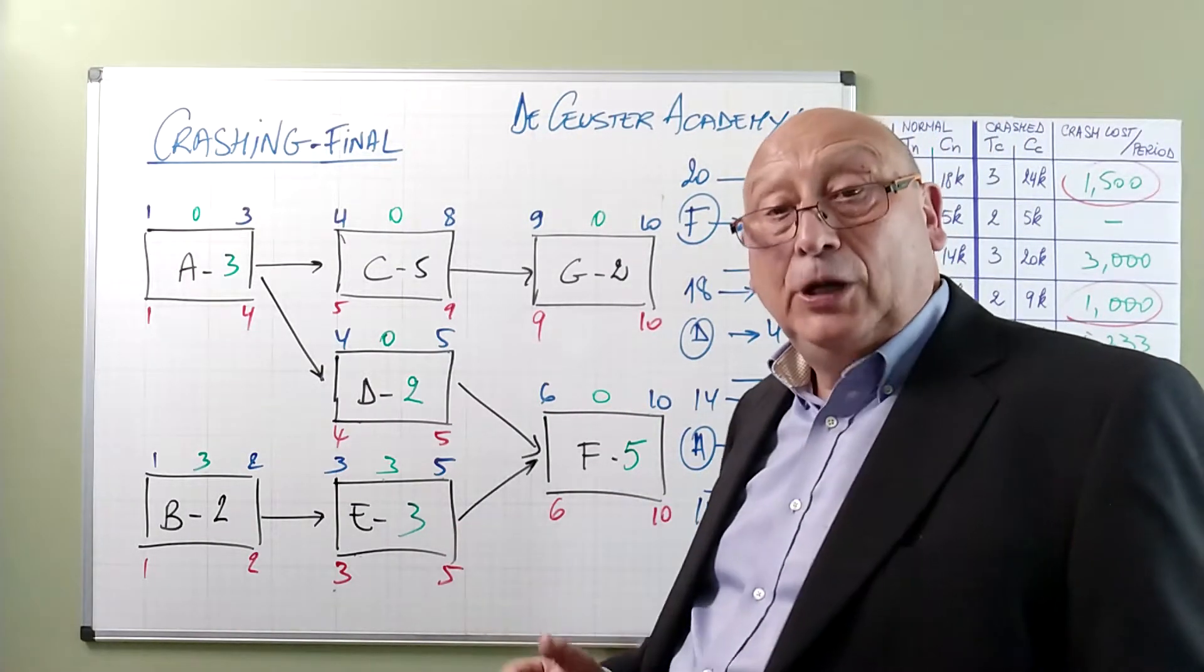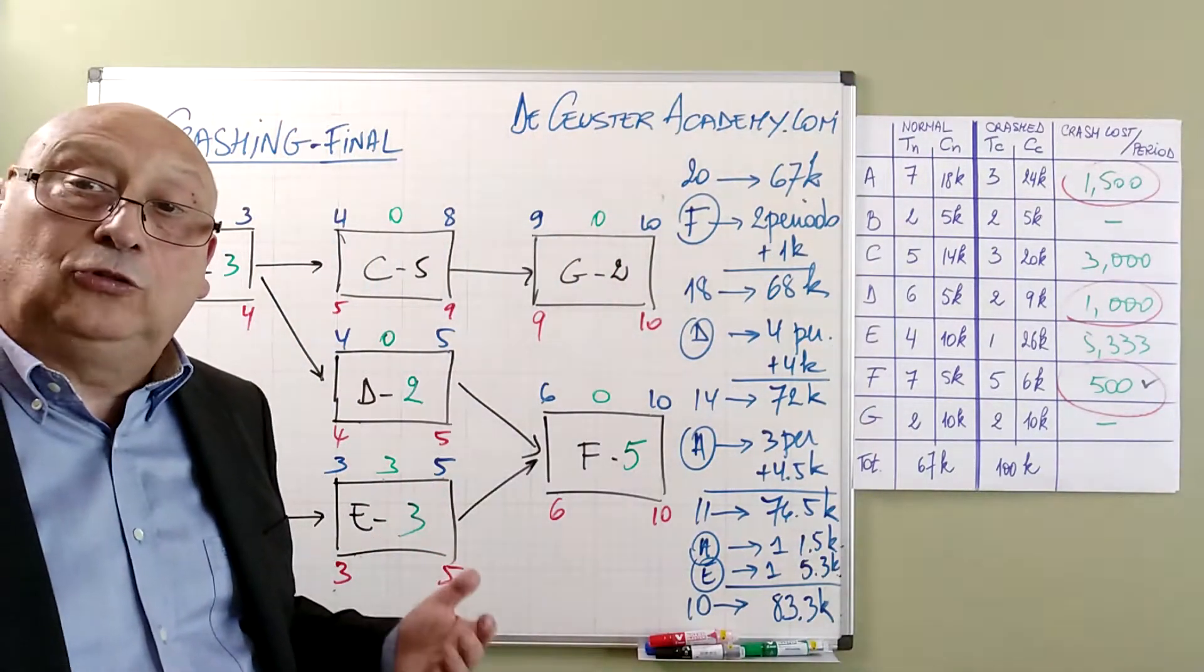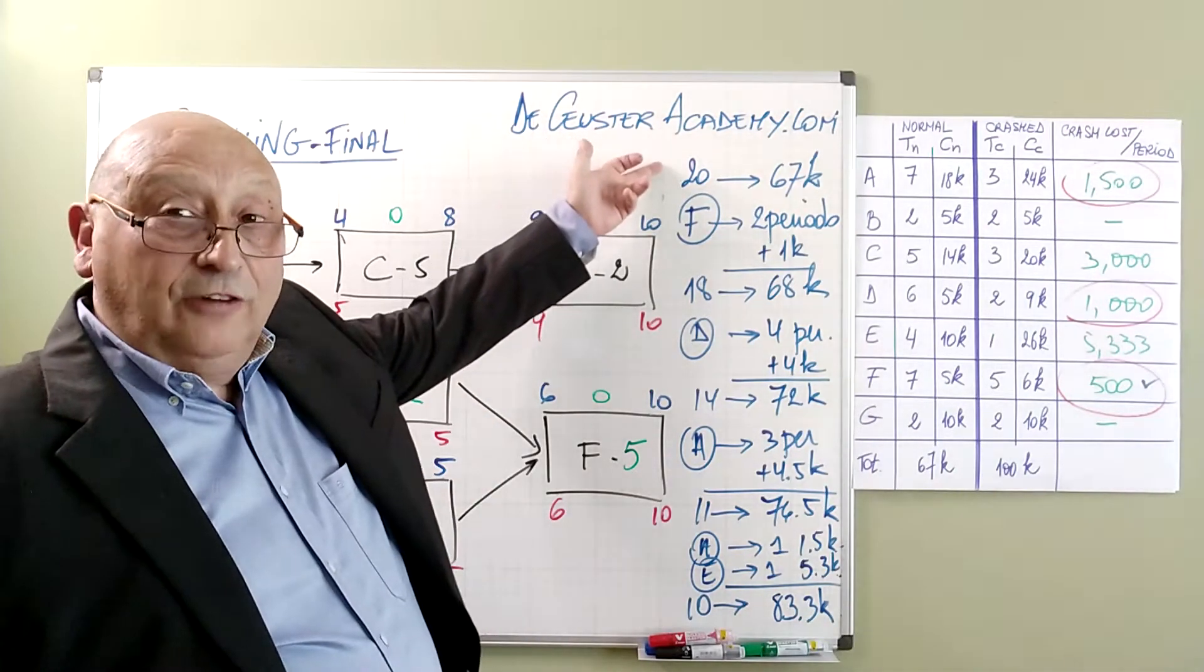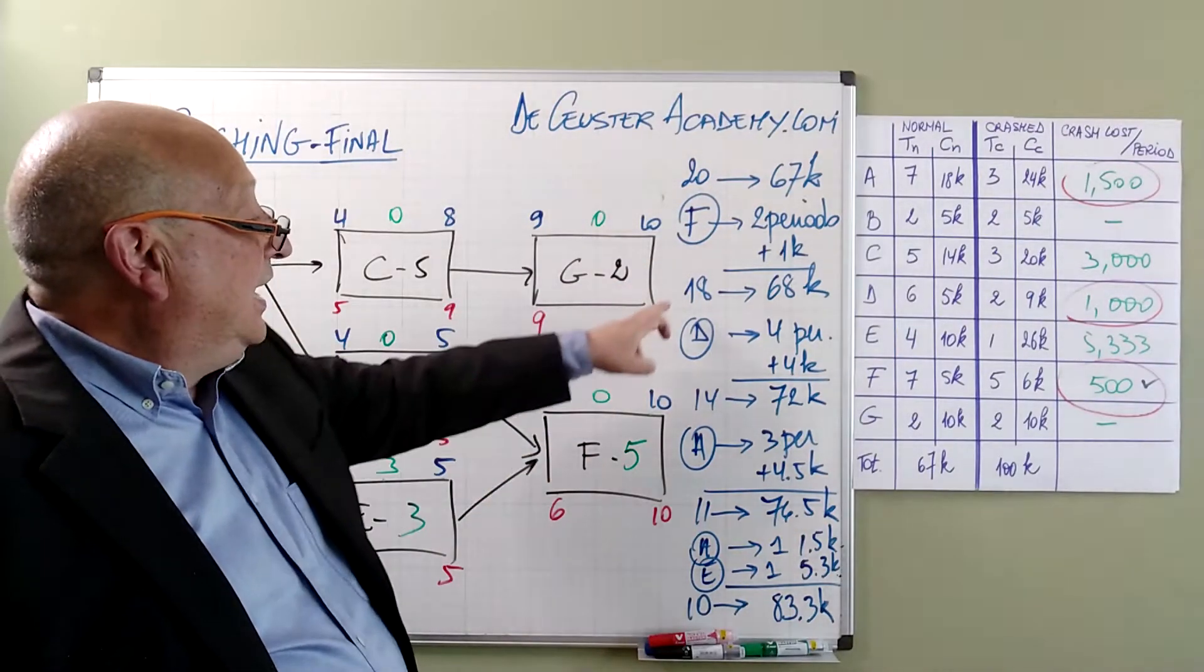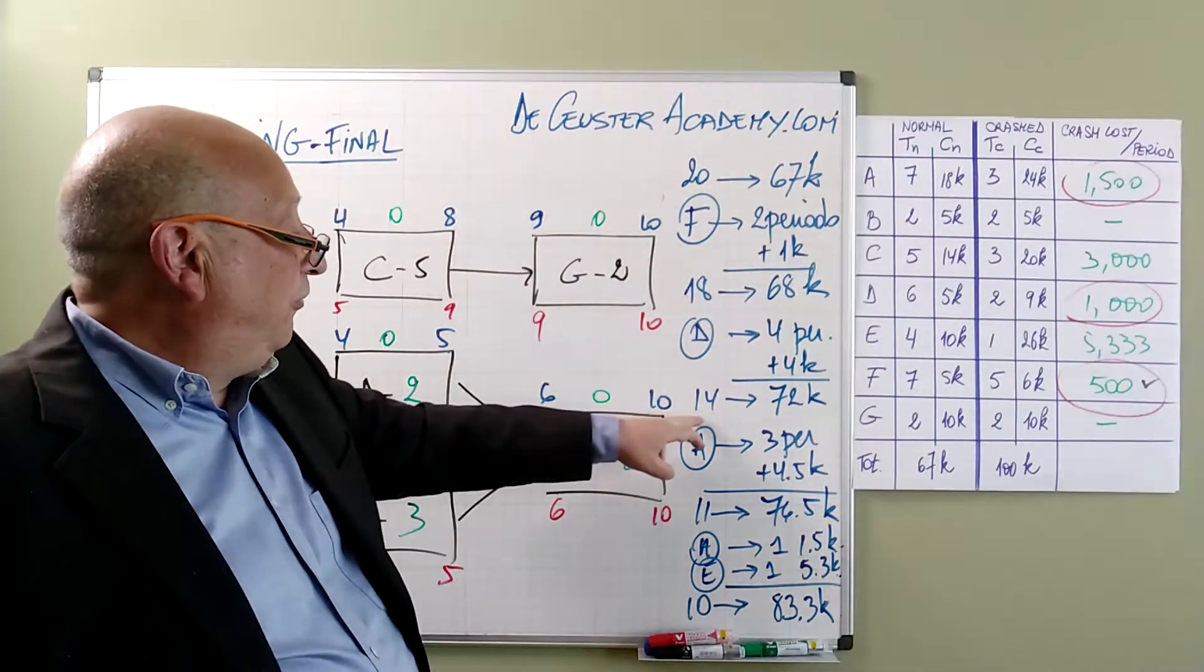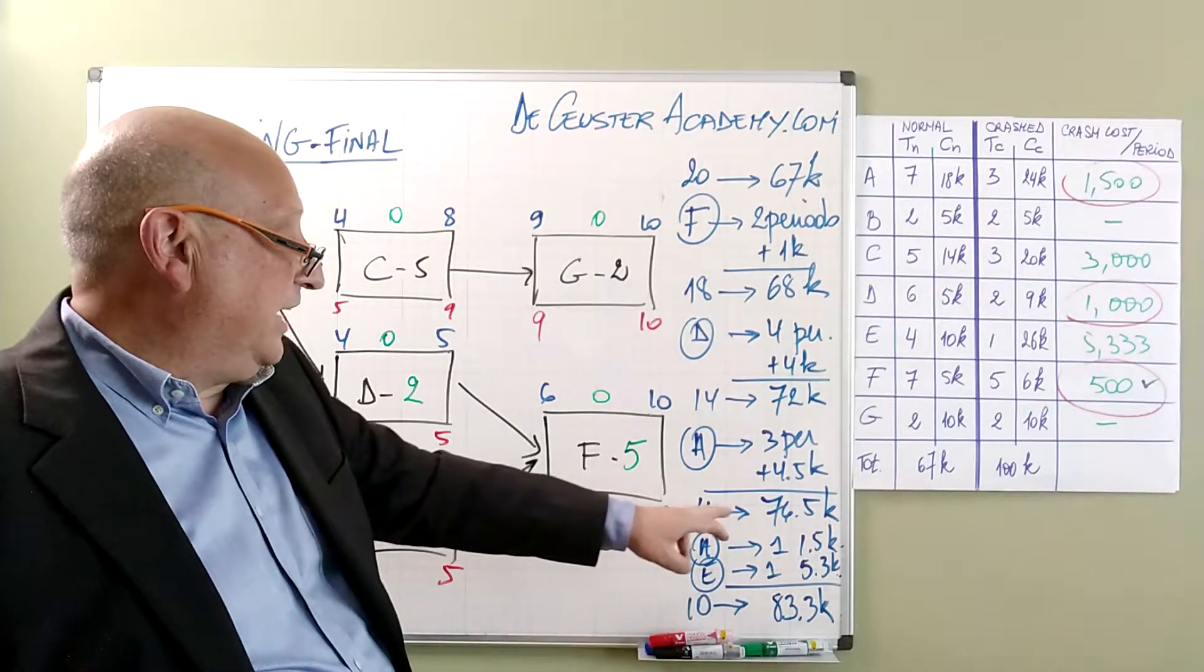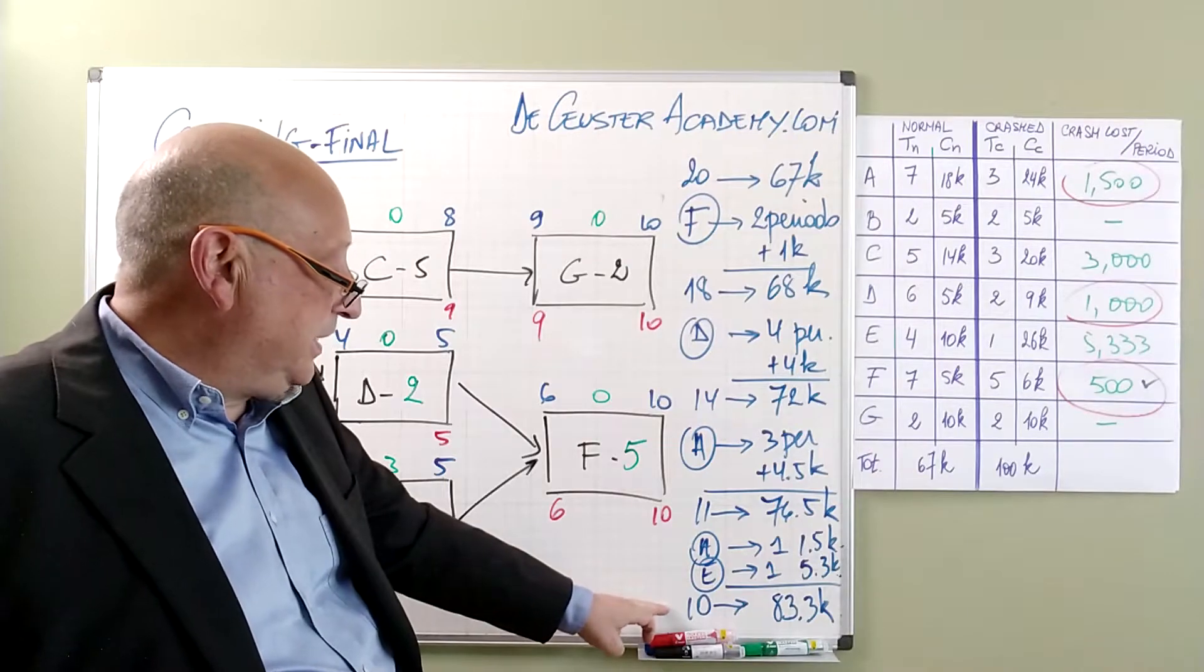In summary, we can say that the relationship that we have between the cost and the duration: a duration of 20 periods gives us a cost of 67K, 18 periods we have 68K, for 14 periods we have 72K, for 11 periods we have 76.5K, and for 10 periods we have 83.3K.